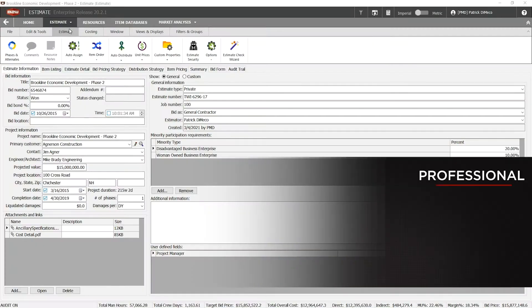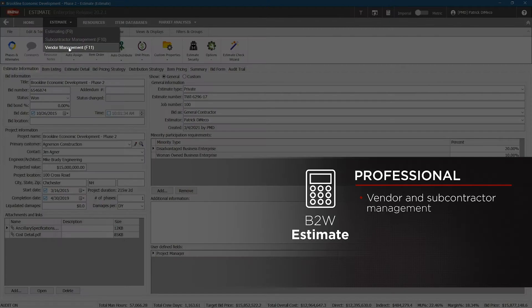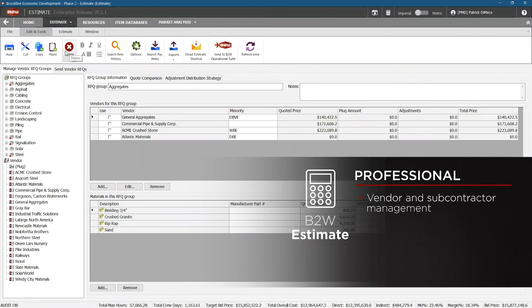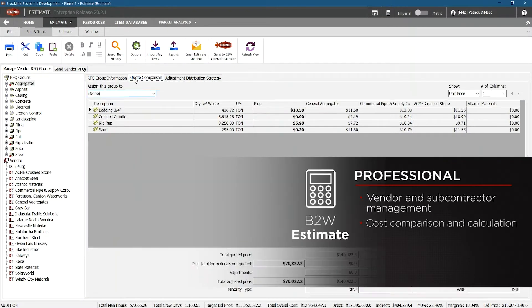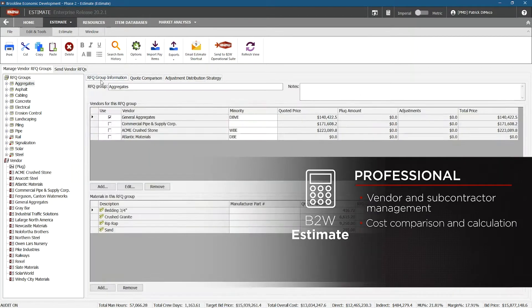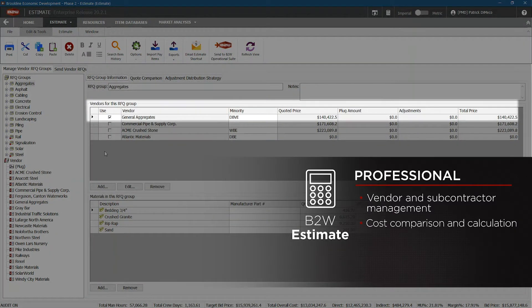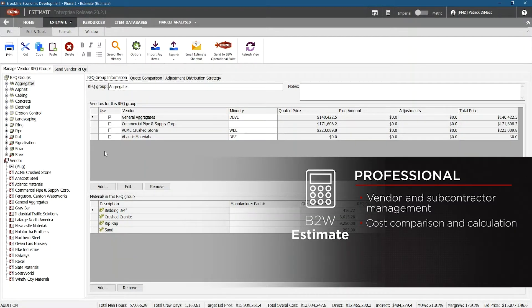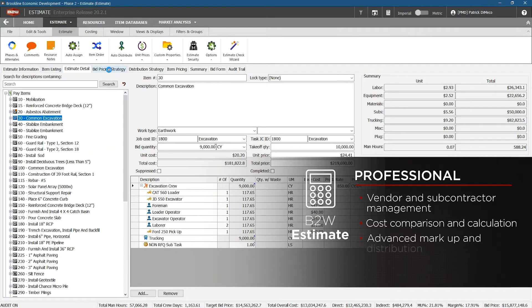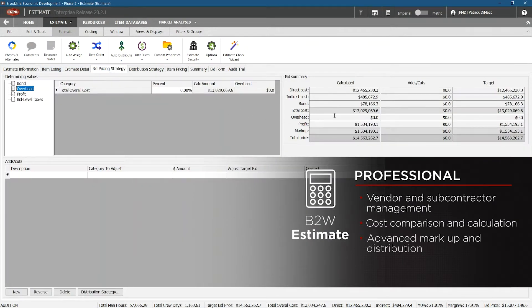When you move up to the professional edition, you gain access to features like vendor and subcontractor management. These make it easier to evaluate and manage quotes from vendors and subcontractors within the estimate and compare the impact of selecting one over the other. Seeing those calculations update immediately allows you to make quick and accurate decisions when time is tight. The professional edition also has some advanced options for calculating and comparing costs, applying markup, and distributing indirect items.